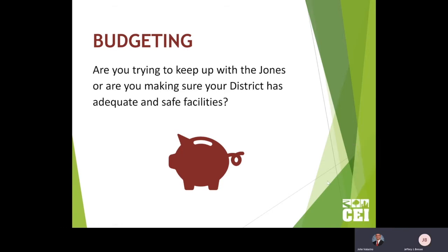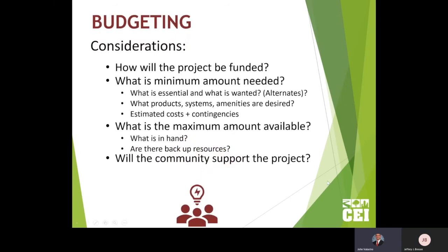There are common funding routes. The most common one is the bonding process. But there are districts that say, okay, we can't pass a bond, so let's look at our current budget, time warrants, tax notes or other means, fund balance designation, even community donations. Just a word of caution, don't get too excited about community donations. They usually have a lot of enthusiasm early, but as time goes on, they falter and you lose a lot of support. So just be careful. We can talk about funding options and funding routes at a later time.